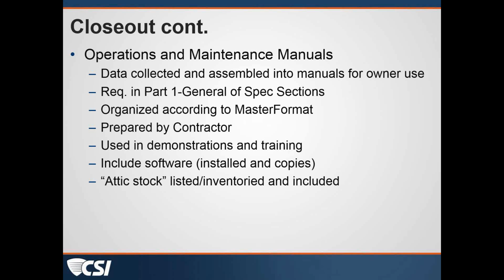In the situation that I was just describing, the owner put it in our contract that we had to check and make sure that the contractor was maintaining the record drawings. So we were contractually obligated to review those drawings before we signed off on the pay app each month, to make sure they were being maintained.